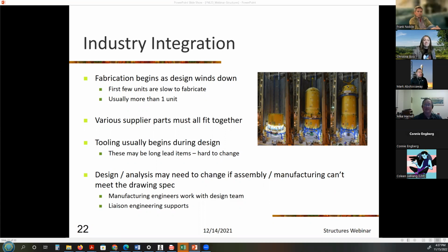So, you'll be submitting your rock sims, you'll be submitting written reports, you'll be submitting performance statistics. And then we have a lot of reviews every couple weeks. So you should never get to the point where you're 4 months in or 3 months in, for example, and then suddenly you find a problem. We should always discover them within a couple of weeks of it happening and help you make those course corrections.